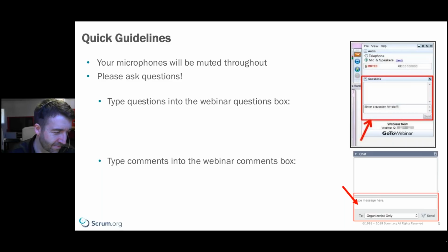I think that overall, you estimate how you need to estimate, and whether you're using story points or shirt sizes or whatever method that you decide, that's what's giving you the estimate. Because hours, I can guarantee you, if you estimate in hours, you will be wrong. Until you start working, you have no idea how long it's really going to take, which is why the ideas around sizing and using other ways to estimate sizing help you in that. So in Excel, we know about what that is, give or take, within plus or minus, but we're not saying it's going to take us 3 hours, because we know if we say it's going to take us 3 hours, it's probably going to take 4.5, or it may take 2.